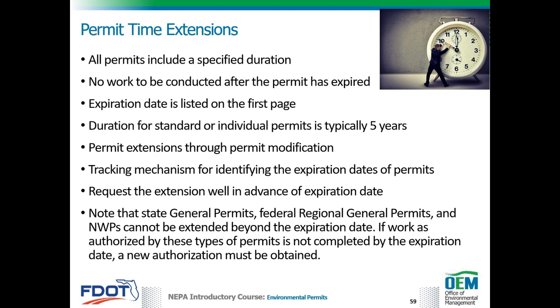When a nationwide permit is issued, the expiration date is clearly identified. If construction on a project authorized by a nationwide permit has begun prior to the expiration date of the permit, FDOT has an additional year to complete the project.